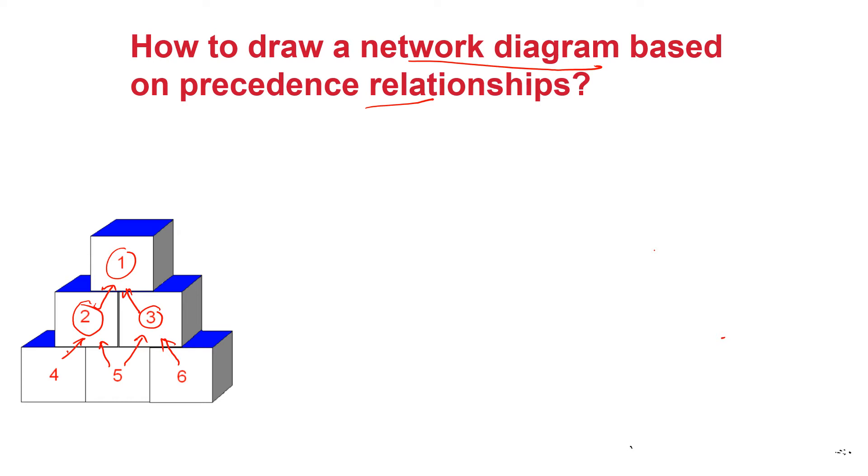So let's draw a standard network diagram that could be understood by project management professionals. So whenever we start a new project the norm is that we have a milestone activity which signifies start of a project. So here we start and here you can see 4, 5, 6 has got no predecessor. So these are the activities that could happen right away.